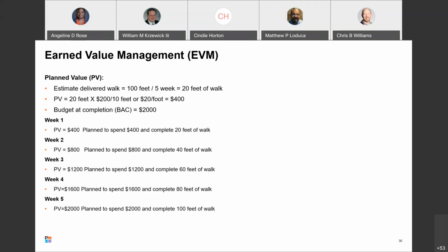All right. So we still have scheduled time left if there are any questions. I have a question for everybody else out there. The actual cost and the earned value, do you know where those numbers come from? Anybody know? In the PMBOK, we have a thing called work performance data. Those numbers, people are going to report them, and they will come in from the project. They'll say, we completed this stuff, and then you'll put a value on it, and your budget will come through, and you'll say, your actuals for this month, we spent this much.